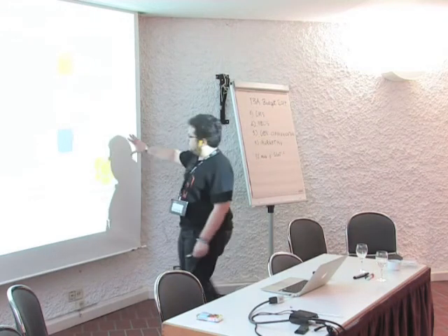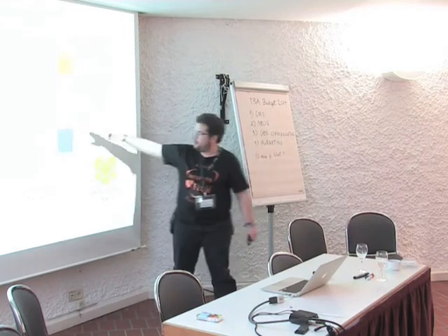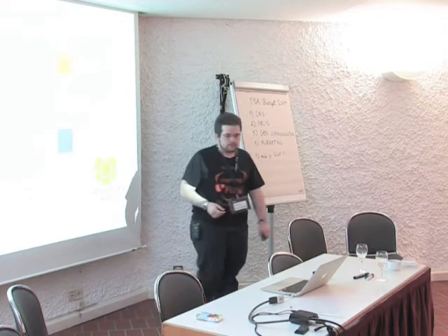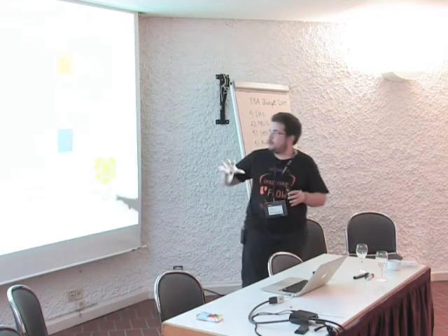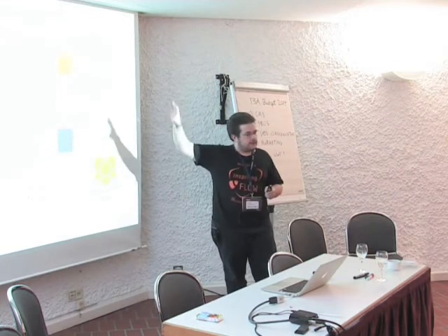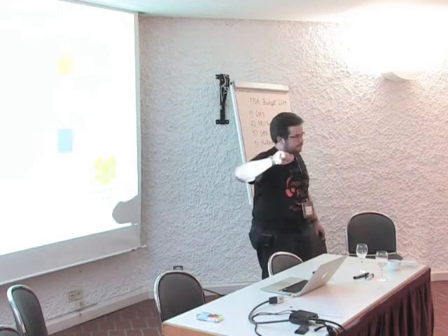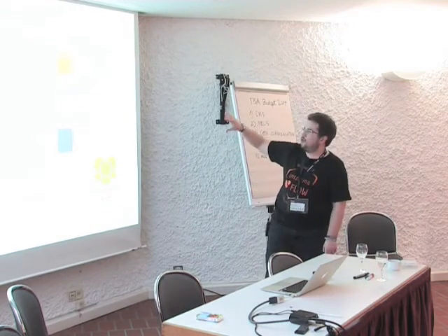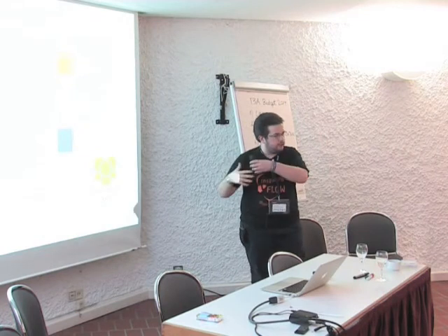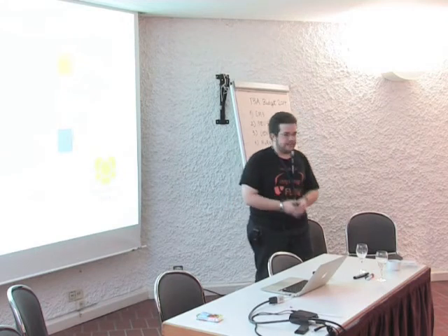So then the team selects stories from the product backlog, puts them into the sprint backlog, and then these stories are implemented. So at the end of each sprint, you have a so-called product increment. That is the result of the stories that were picked into the sprint backlog. This is sometimes called a potentially shippable product. So this means that this product in itself should already be as much as possible done and fully implemented.